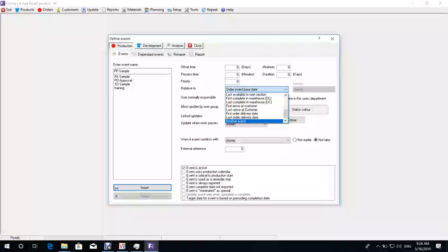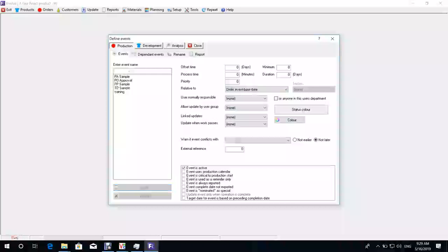So you send out your PP sample 1 month before, and then the approval comes in. Yeah, because we have to consider in case we have any comments or revising. So 1 week we have before production. Okay, so I'll add a second activity there for PP approval. The first one is just our PP sample. I've added that to the list. You can see it there. And then I'll say the PP approval as well.